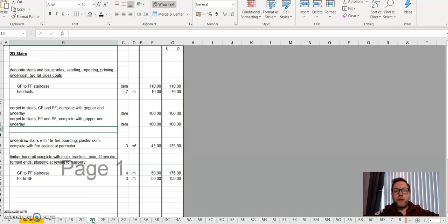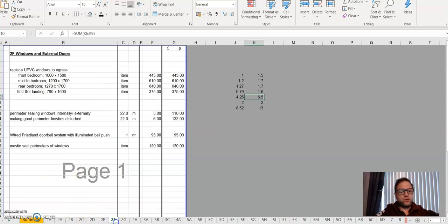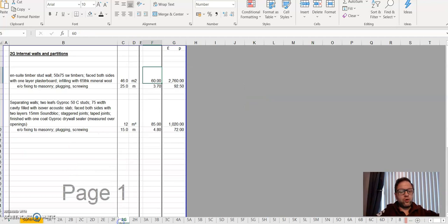What I recommend you do then, if you're going to use the same QS, is send him your updated report and say, Luke, this is what my builder charges, so in the future, could you put them in? Then he'll be able to tailor his reports to your builder. Because it's okay using National Federation rates, but if your builder gets really good prices on tiles, then he needs to know this. So let me give you a quick walkthrough. You go through all of this, 2D, 2E, you can see 2F. You can literally just keep going all the way through.